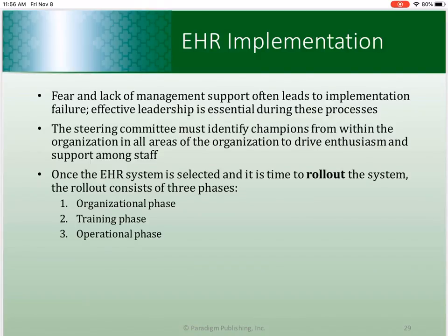The steering committee of the facility must identify leaders in each department who will champion the EHR system. These leaders should encourage adaptability and flexibility in their discussions with coworkers and act as a link between the departments and steering committee to provide staff feedback and suggestions for implementation.